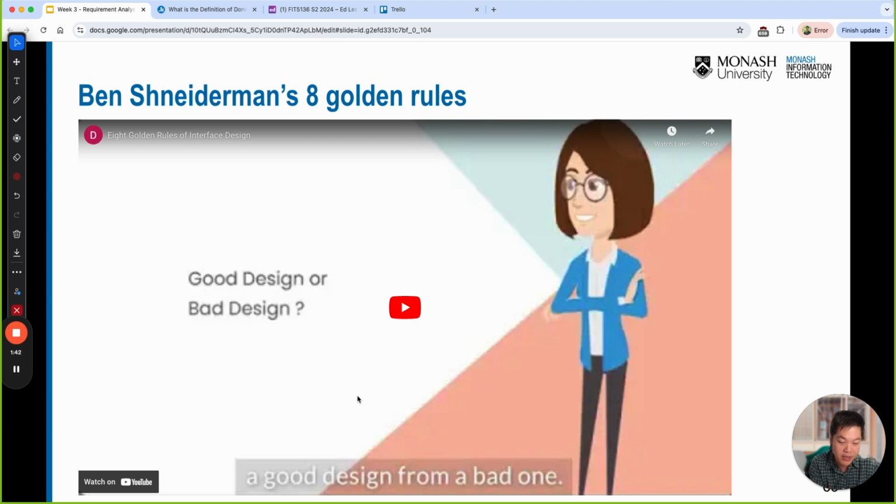What I mean is that when we say delete an item, I suggest we need to add the value. What is the benefit, okay? For the delete, I think this one is good. Add the benefit a little bit. For example, as a user, I want to be able to delete an item in the shopping cart, so that I can change my mind. I want to have a second confirmation. This is quite vague because I don't know when this user story will happen, right?